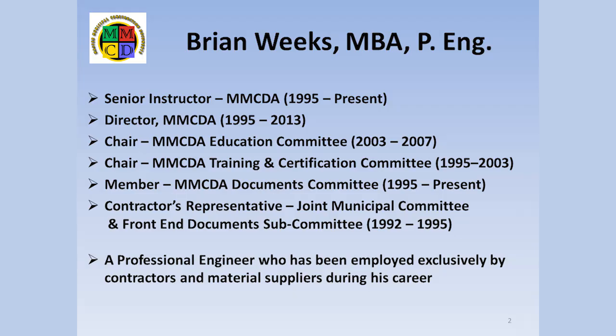The standard general conditions in the MMCD make it mandatory for contractors to provide daily records of items for which they wish to be paid in all circumstances where work has been done but pricing has not been resolved in advance. Most significantly, failure to provide these records by the end of the next business day invalidates any entitlement for payment which would otherwise exist. In short, no forms, no pay.